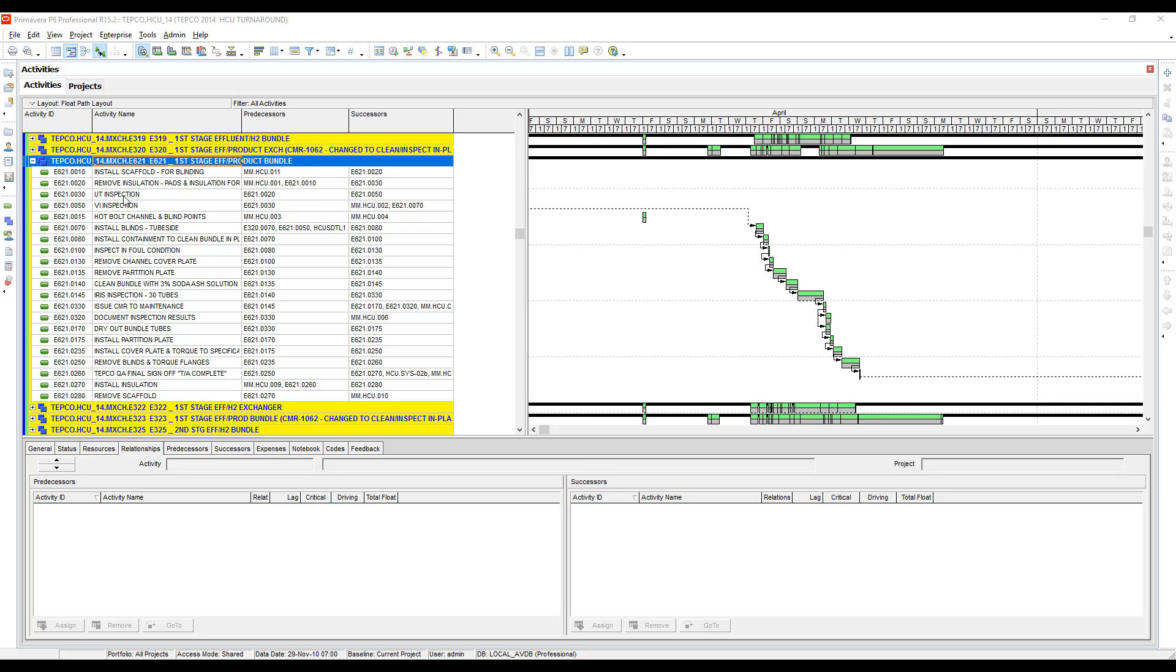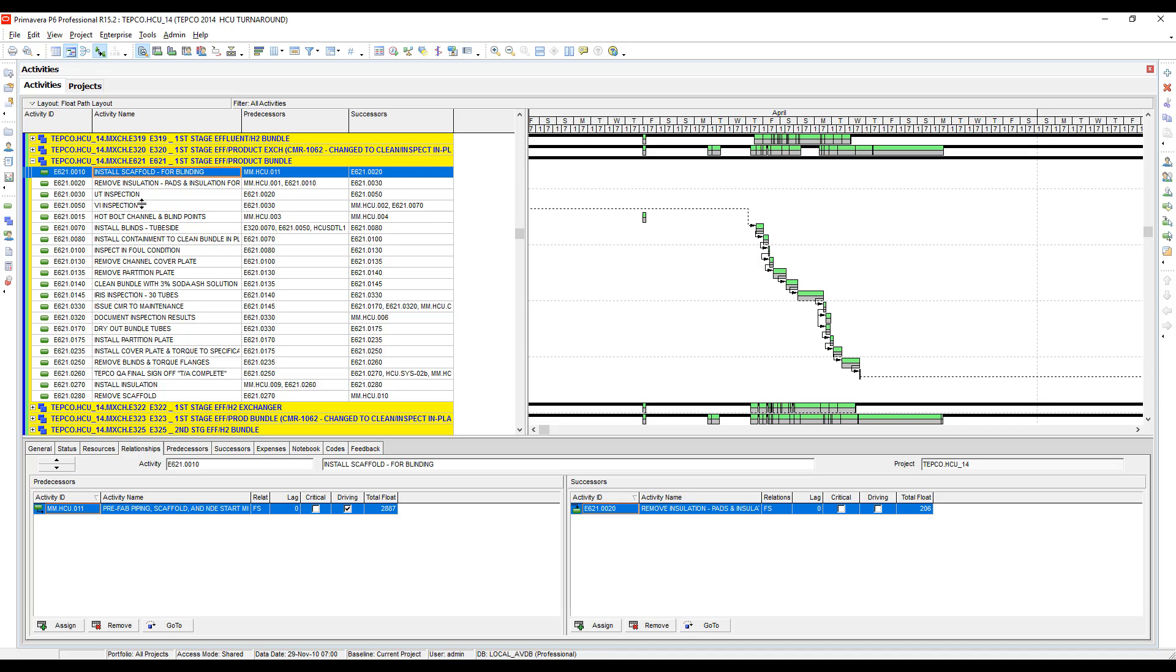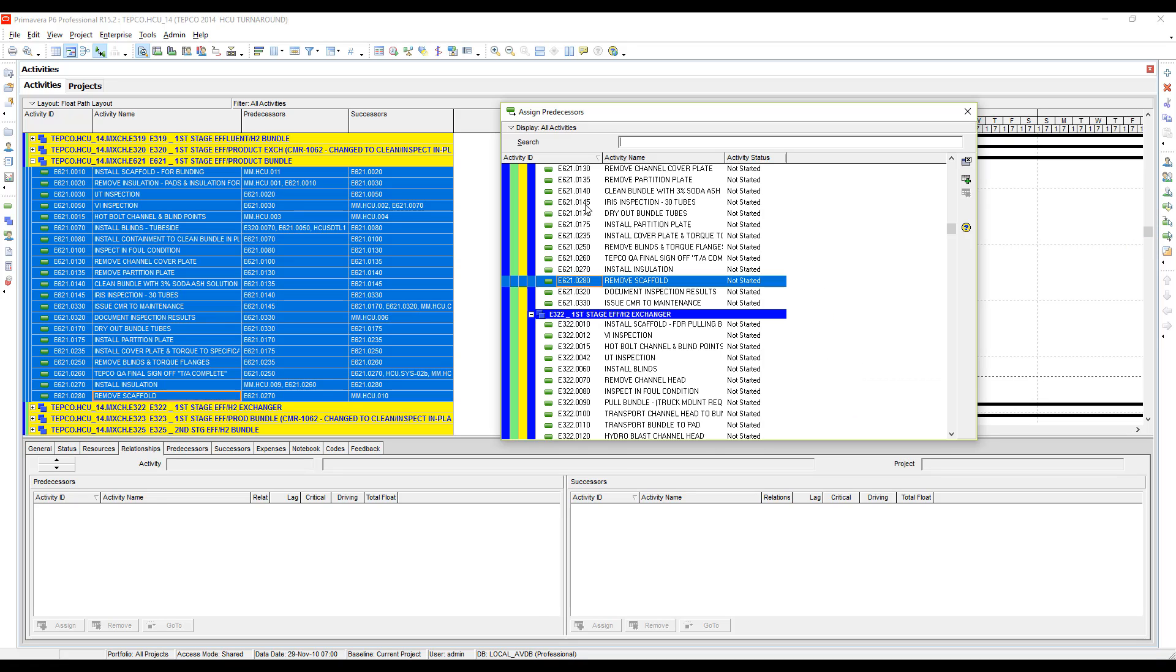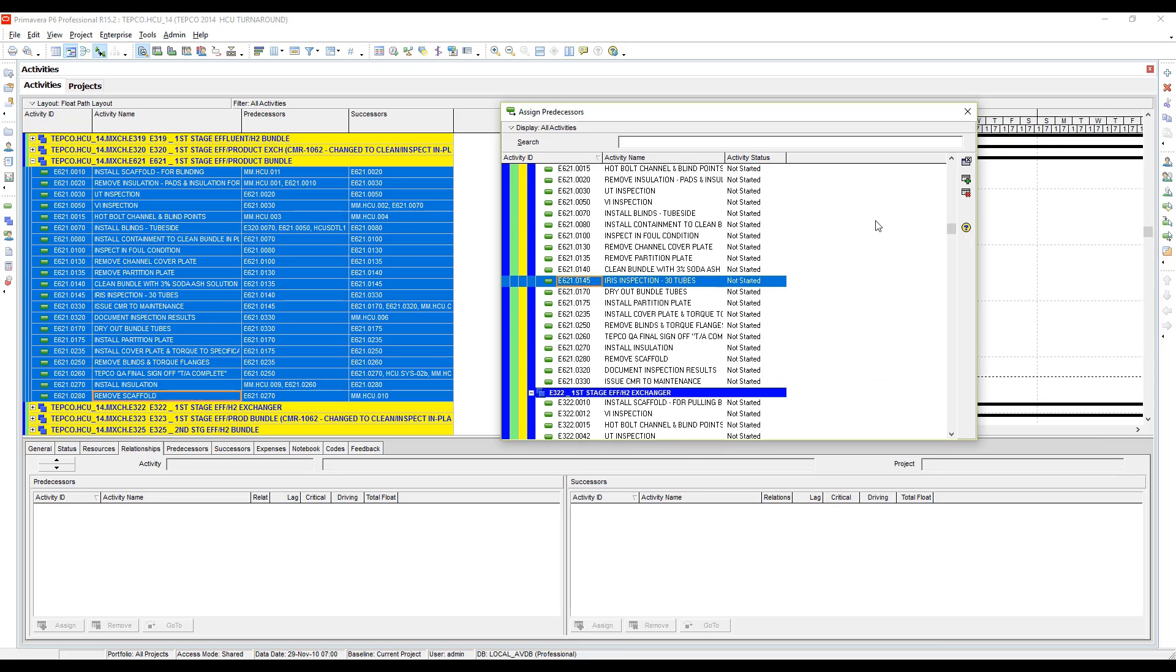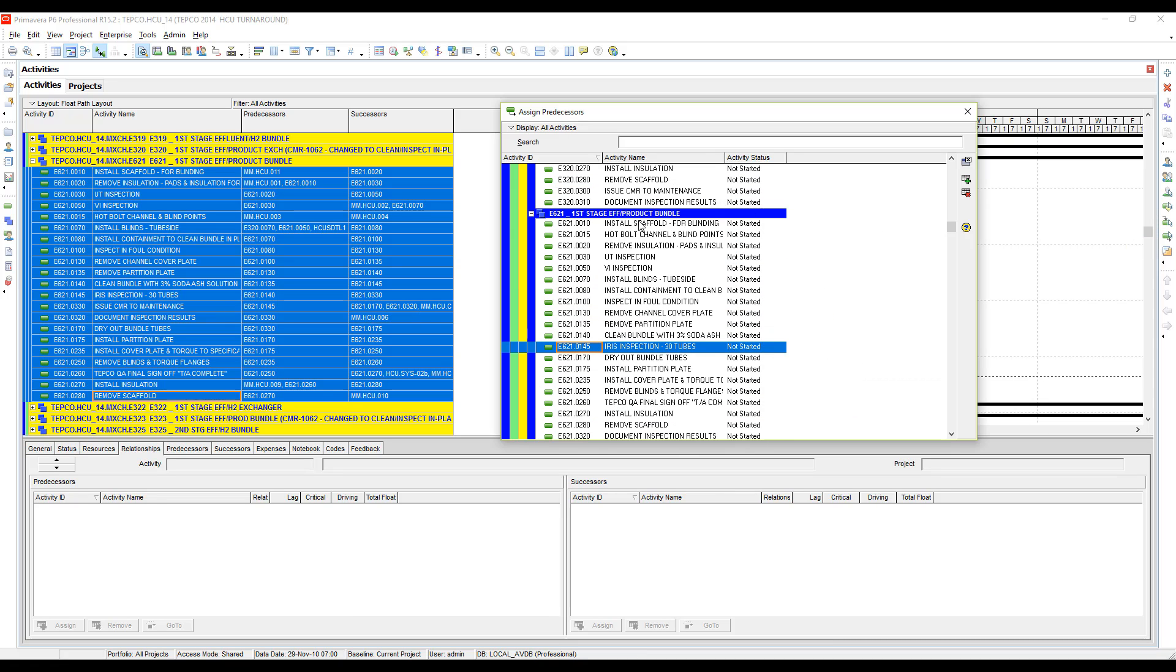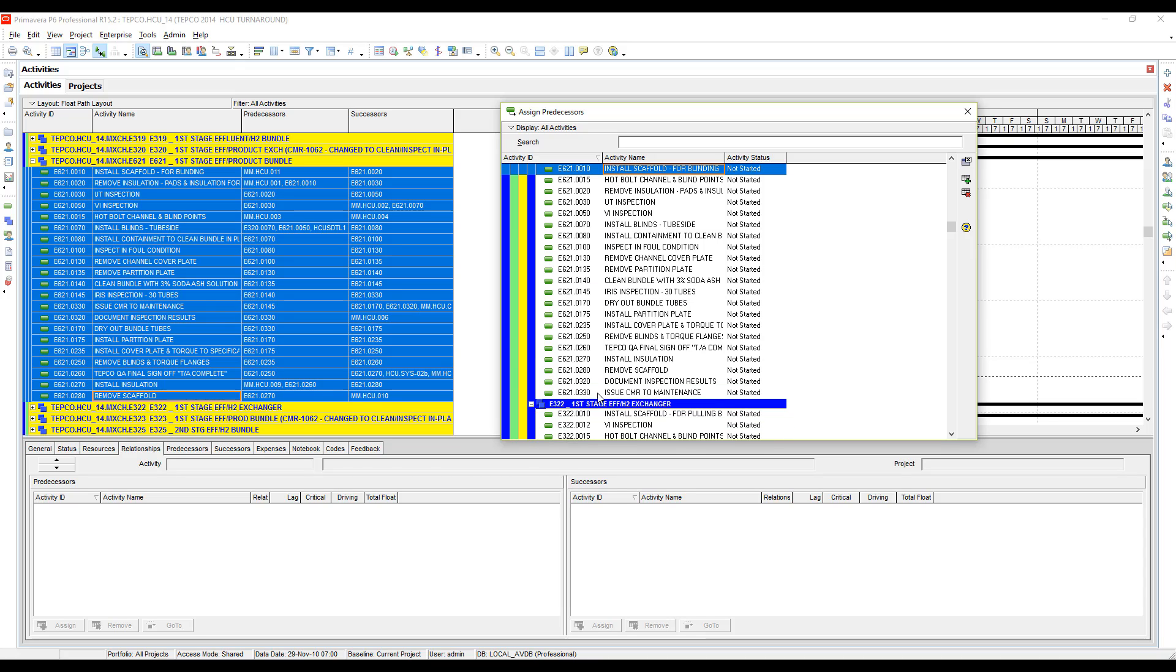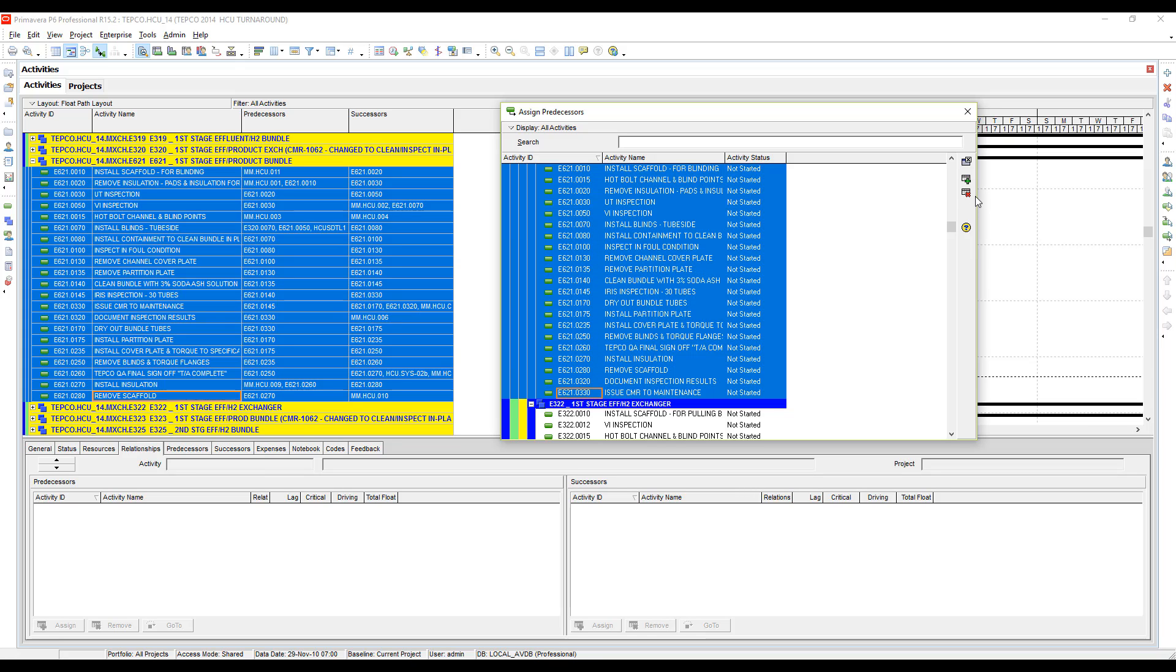Oracle has not given us an unlink button yet, but what you can do is if you needed to delete all the relationships on a specific job, you could shift-click to select all the activities within that job and come over to the predecessors button over on the right-hand side. You could also click in here, and if you actually shift-click the entire job inside the predecessors window here, which may take a few seconds to activate, you'll notice that I have the red X here. I could actually remove every relationship internally on that job.